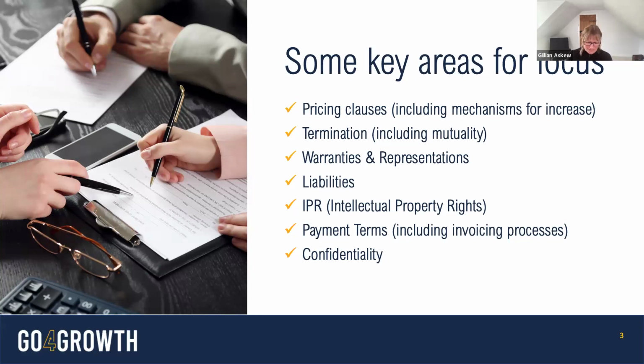In terms of liabilities and indemnities, like most things, they will differ from contract to contract, but liabilities, fairly obviously, look to lay out what each party is liable for. For example, it might say that no party is liable to the other for any indirect losses, loss of profits, turnover, or damage to goodwill. And you can check with legal advice on this, but what you're thinking about is whether you're required to indemnify your customer against any of these things. Do you need insurance to cover any of these liabilities?